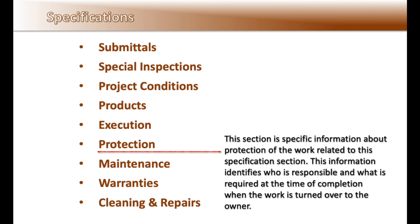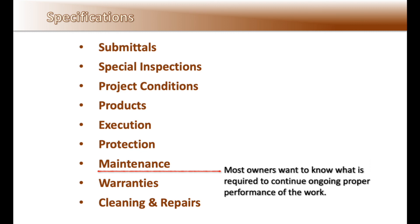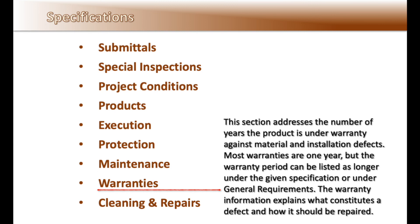It is very important to understand and qualify these protection requirements in your proposal. In reference to maintenance, most owners want to know what is required for continued proper ongoing performance of the installed work, and may require you to prepare a maintenance manual to be submitted when the project is turned over to the owner. The warranties section addresses the number of years a product is under warranty against material and installation defects. Most warranties are one year, but the warranty period can be listed as longer under a given specification or under general requirements.